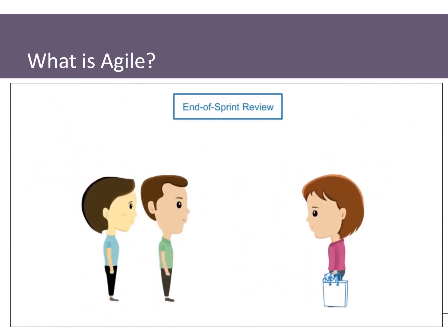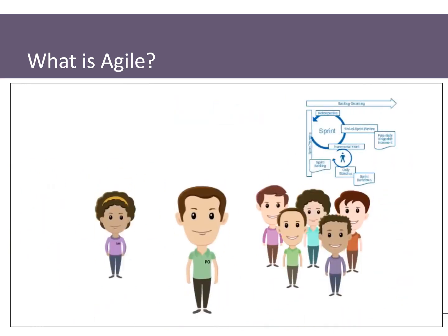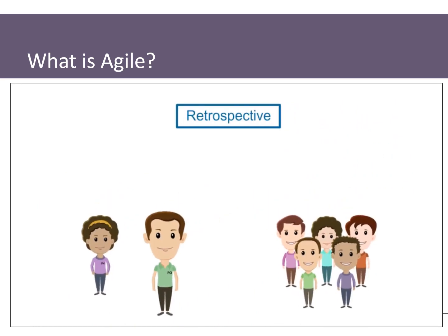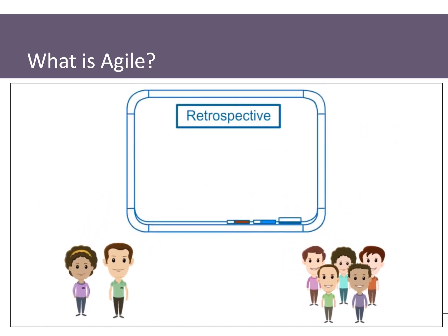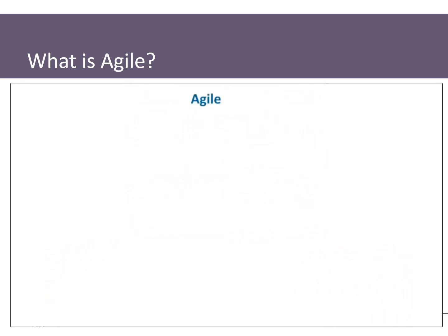Now that customers can shop on the internet, Mary and Rajesh talk to them in order to get feedback on their experiences. This information is used to identify new requirements for upcoming sprints. As final action of the sprint, Tammy conducts a sprint retrospective meeting with the Scrum team. Here they systematically evaluate what worked well and what did not during the sprint, identifying what can be improved in the future. The retrospective completes the sprint.